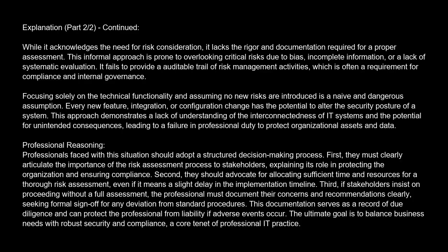Professional reasoning. Professionals faced with this situation should adopt a structured decision-making process. First, they must clearly articulate the importance of the risk assessment process to stakeholders, explaining its role in protecting the organization and ensuring compliance. Second, they should advocate for allocating sufficient time and resources for a thorough risk assessment, even if it means a slight delay in the implementation timeline.